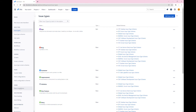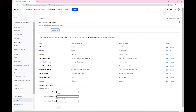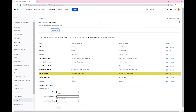The other configuration is related to the issue linking options. Go to the issue linking menu option. We will be using a unique link between initiatives and Epics. We will call it initiative dash Epics. For the outward name, we will use initiative contains Epics. For the inward name, we will use Epics belongs to initiative.